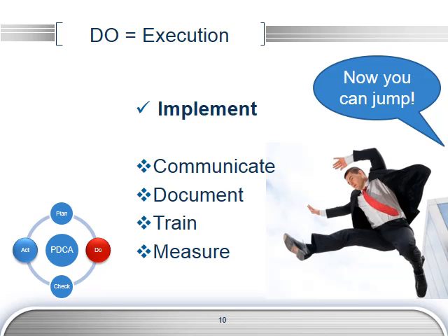Additionally, and I did kind of mention this, but you want to ensure that you are measuring. You start measuring in the do what it is that you expect to measure in your check phase. So you would want to start implementing that, and if you needed a baseline for that measure, perhaps you might even need to put that into your plan phase and say, I need to establish new measures that don't exist and gather a baseline so that I know what to expect as an improvement as I go through this project. So now you've actually seen the entire model, and it's just that simple.